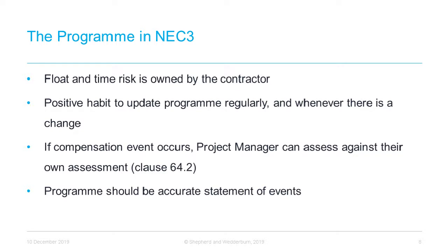The accepted programme should also show any float. Float is essentially leeway built into the programme to allow for any delays or problems without delaying the overall completion of the works. Float is calculated by subtracting the time necessary to perform a task from the time available to perform it. You can have total float, terminal float, or time risk allowances.